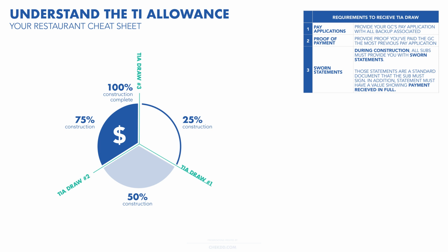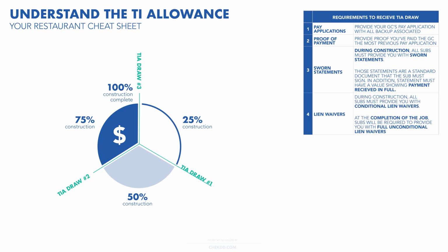Furthermore, landlords are cautious about potential liens on the building. Any builder or subcontractor involved in the project can place a lien on the property if they're not compensated. This legal safeguard, enforced by the government, aims to protect contractors' rights. Lien waivers serve as legal documents signed by both the general contractor, GC, and subcontractors, affirming adherence to legal regulations. These waivers detail the amount involved and are signed by each vendor, confirming receipt of payment.